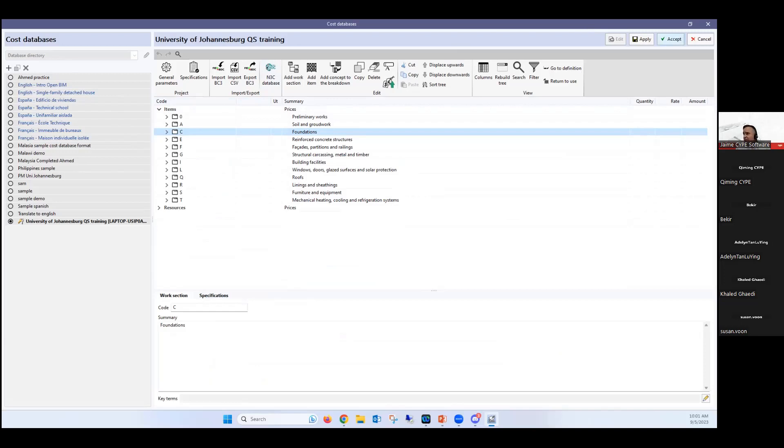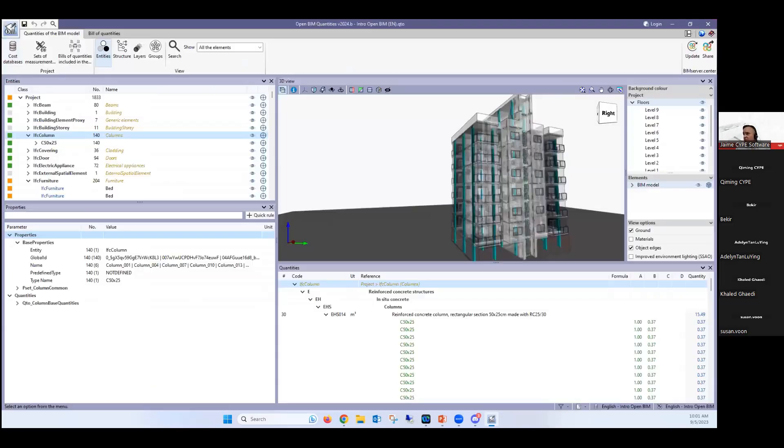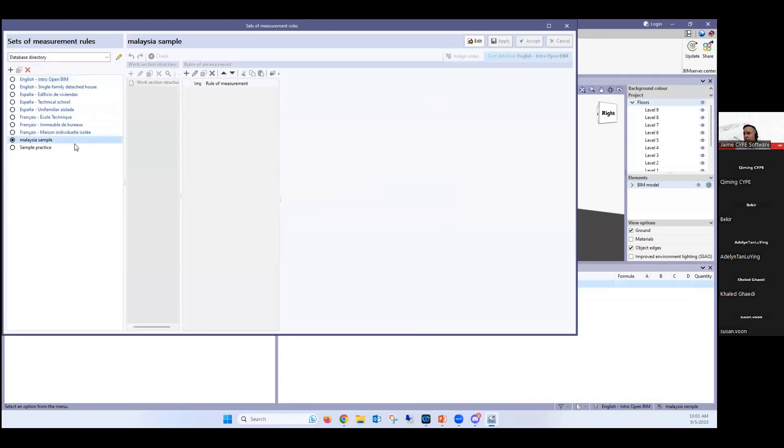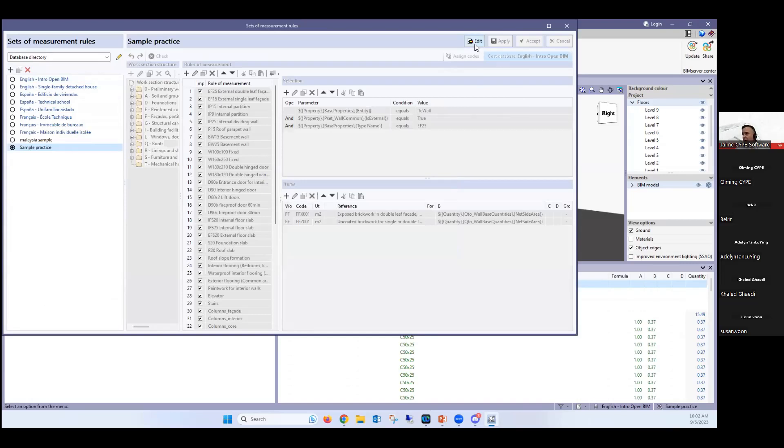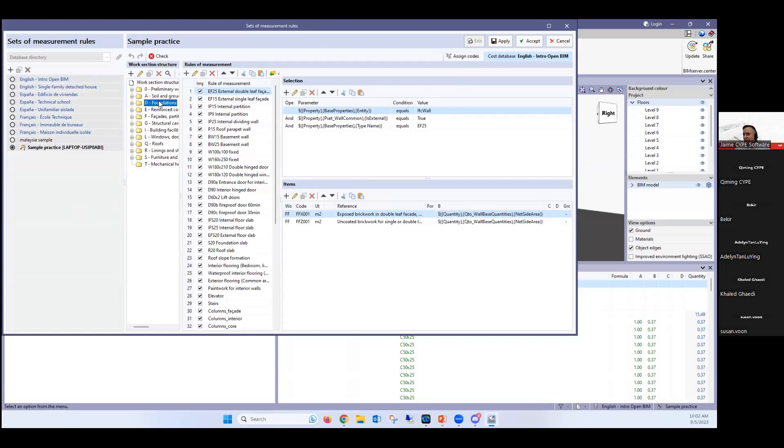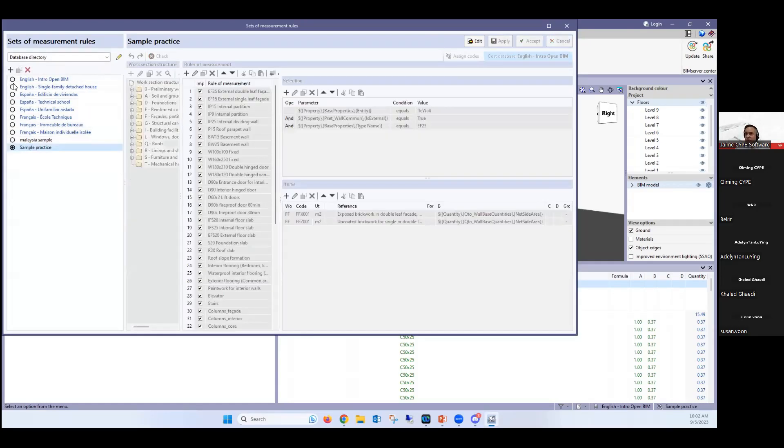Now, the cost database is one thing that you need to do, but then the second step that you need to do, you need to give it a set of measurement rules. Now, the set of measurement rules are not as detailed as in the programs that you're working off a 2D drawing, because you have to know exactly up to what point you're measuring in each of these sections. But now, when you're working in BIM, all of the BIM elements are considered separately. So, all that you have to do here is the type of set of measurement rules you need to do is tell the program what you want it to include and how you want it to measure each section. For example, if you look again at the area of the foundations, under foundations, you have ties, you have foundation elements, you have slabs, et cetera. And now here on the right, you can have a rule of measurement for each of these areas, and you could tell the program what you want it to include in these rules of measurement. It's quite simple, and once that it's set up once, it's quite easy to reuse.